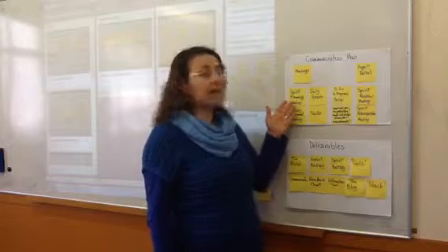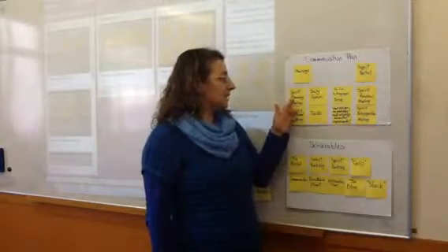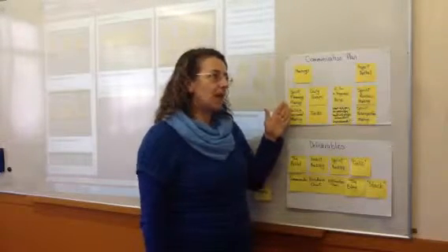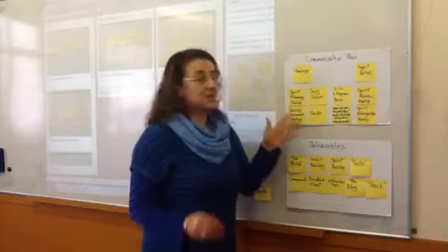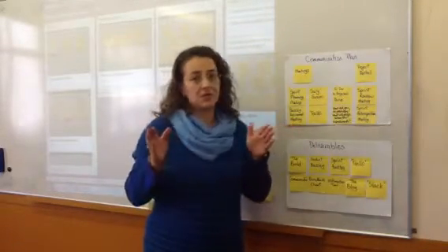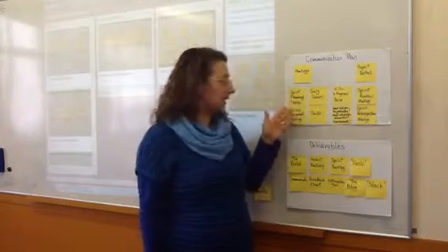So we need to have perhaps about 4 or 5 of those, and we need to have a planning at the beginning of each, which will take up about 8 hours if the sprint itself is a whole month in duration. So for a 2-week sprint we only need to meet for 4 hours right at the beginning.